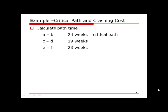The time spent on the critical path determines the project duration. If we want to crash the project and reduce its duration, crashing activities not on the critical path will have no effect. The first rule of project crashing is that all crashing must happen on activities that are on the critical path. For this problem, the critical path is AB, so A and B are the candidates for crashing.